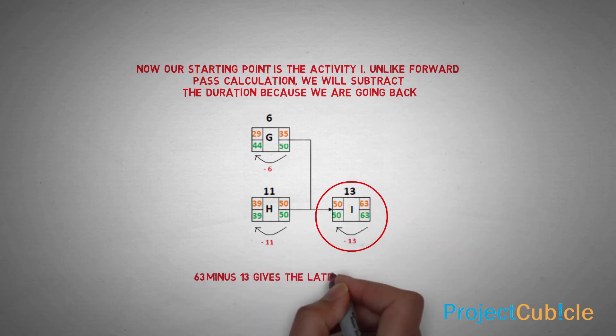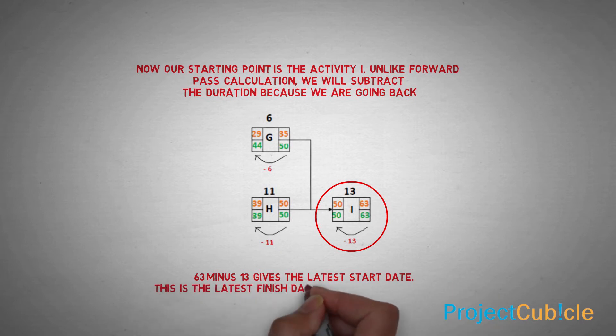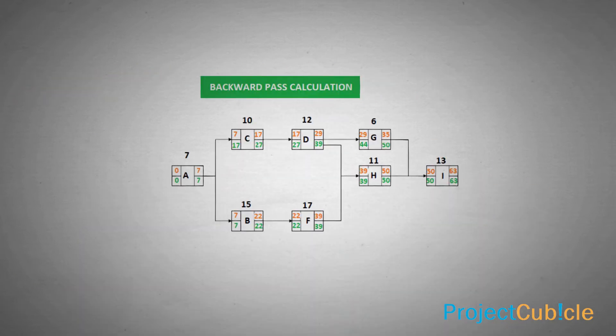63 minus 13 gives the latest start date. This is the latest finish date of both activity H and G. After completing all the latest date calculations, we will have that figure.